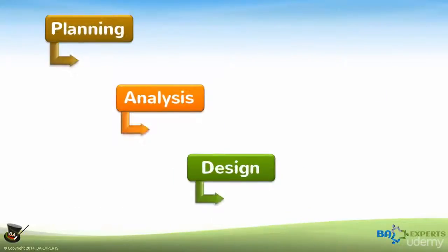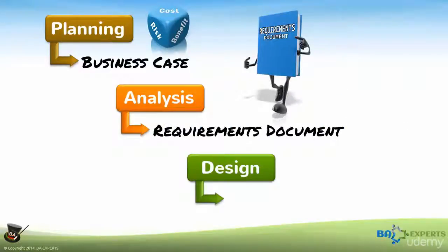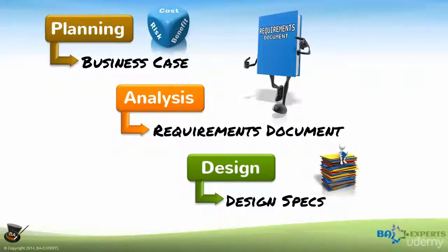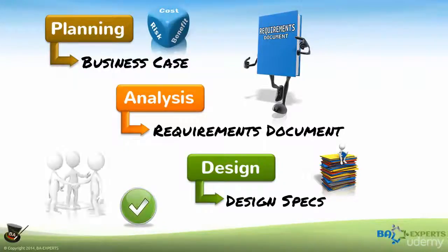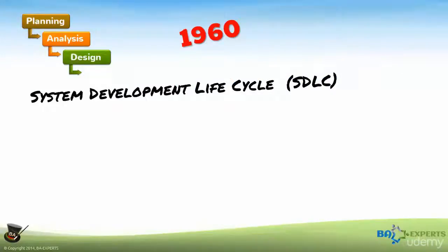Each phase creates a major deliverable, i.e. business case, requirements document, design specification, etc., that can be evaluated by the appropriate authorities to reach a conscious decision whether or not to continue with the next phase. The original SDM that was developed in the 60s and set the foundation for future methodologies was called the System Development Lifecycle, or SDLC.